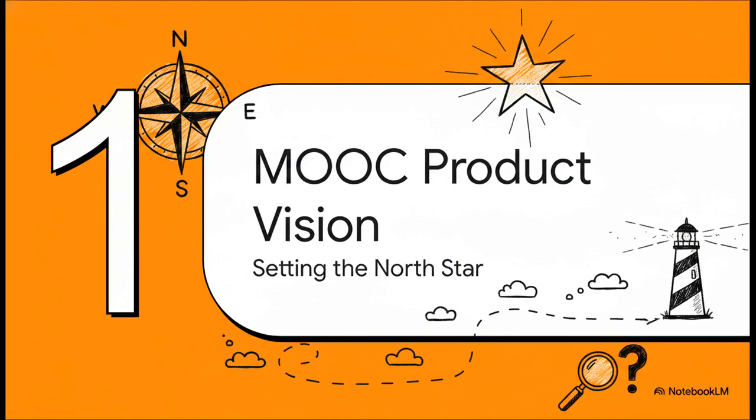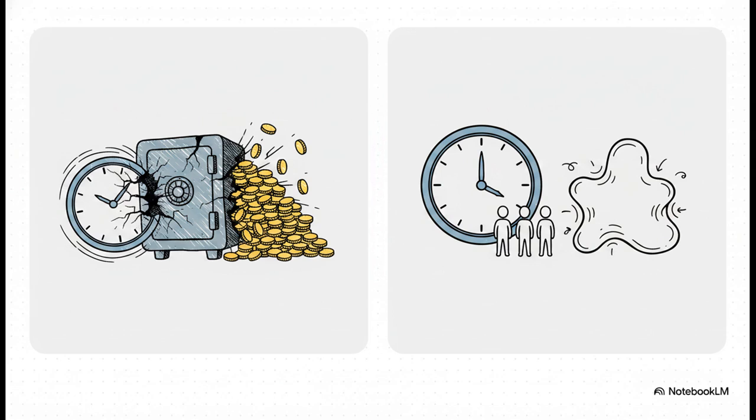So in traditional project management, you've probably seen this, right? You try to lock down the entire scope up front. You plan out every single feature linearly, and the result? Your time and your costs end up fluctuating wildly. But Scrum flips this completely on its head. It keeps the time and the team's capacity strictly fixed, while the scope stays adaptable. Because look, the goal isn't to stubbornly build every single thing you guessed you'd need on day one. The goal is to maximize the actual value you deliver and adapt as you learn.